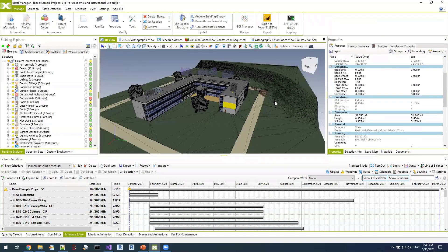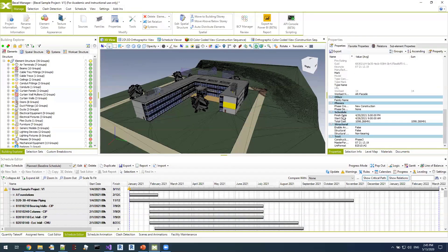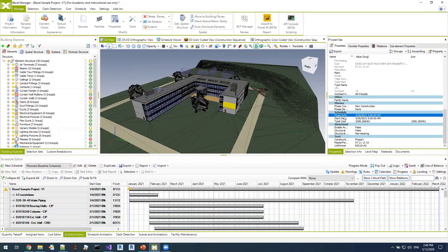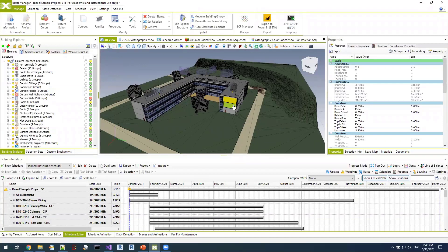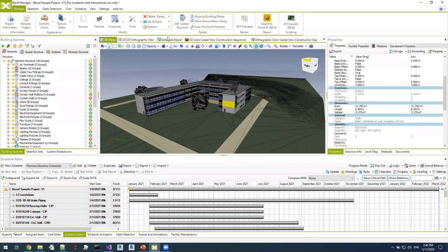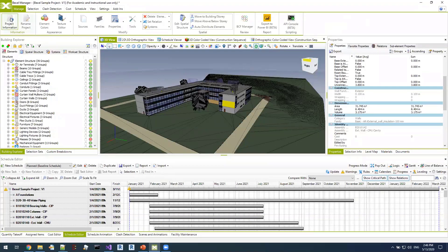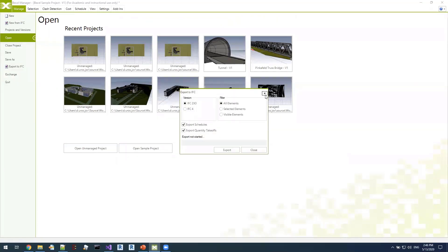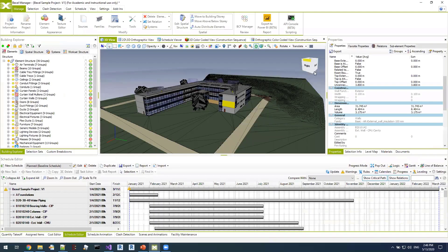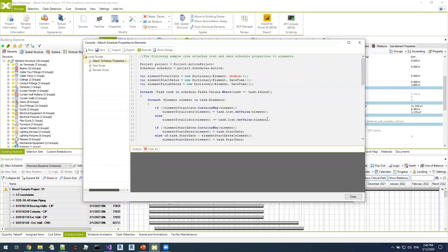I'll quickly run this script — it says it executed successfully. If we close this window and select some elements in the viewer, we can see the newly created properties: a TotalCost property, a StartDate, and a FinishDate created on all elements associated with this schedule. With this information embedded in properties, we can do various things — export them into an Excel spreadsheet for a third-party application to import, or export the entire BIM model along with all properties to an IFC file and exchange it with another application. That was a simple example of what can be achieved using scripts.